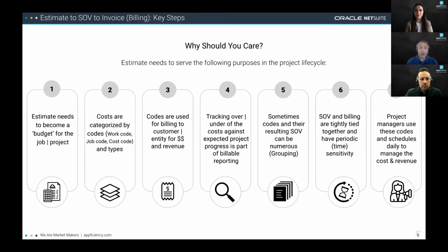So now you can use the CSI code or group of the CSI code or CSI divisions as per industry standard for billing purposes and for sending your billing breakdown to the customer. Now, majority of the time you will see that in the demo that Joyce had also. You have your cost, you would apply your markup, you define your schedule value. So now you can track if you're over or under against each of those expected project tasks, which are really, concrete work, masonry work, etc.